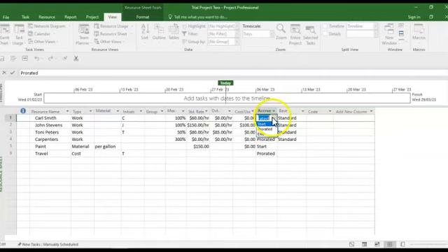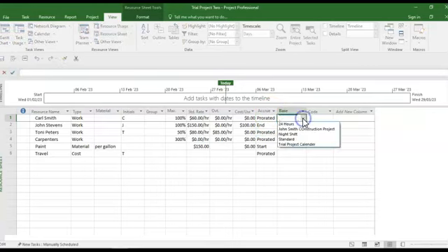All right, so then you'll have how you are paid. Now I have all with this standard calendar, but if you have created, like for instance, in another project, we had created a John Smith project calendar, then you would assign it to the project calendar. All right, so what have we here? The only difference is when you look at work resources, you realize you have the standard fees, etc. Why carpenters? No, carpenters refer to groups of people. Normally, one person would have 100% availability. This states that there are three people, so it's 300% availability.